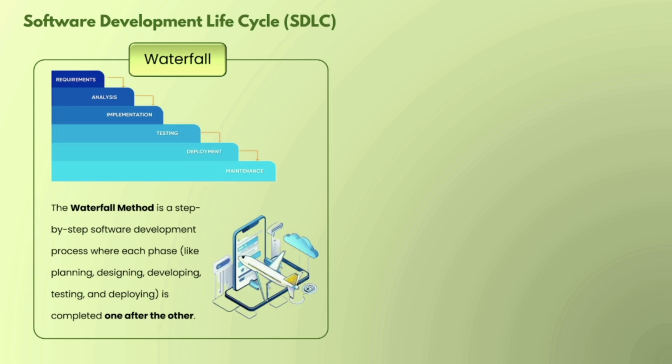A flight booking system generally uses the waterfall methodology. The reasons are that a flight booking system needs well-defined rules for ticket reservation, cancellation and payment processing. Since airlines follow strict policies and last-minute changes can be costly and risky, waterfall works best. All requirements are gathered upfront and then the system is built step by step with minimal changes later.